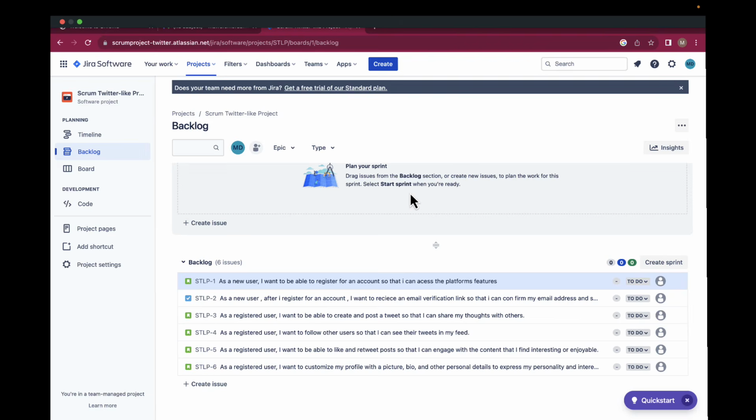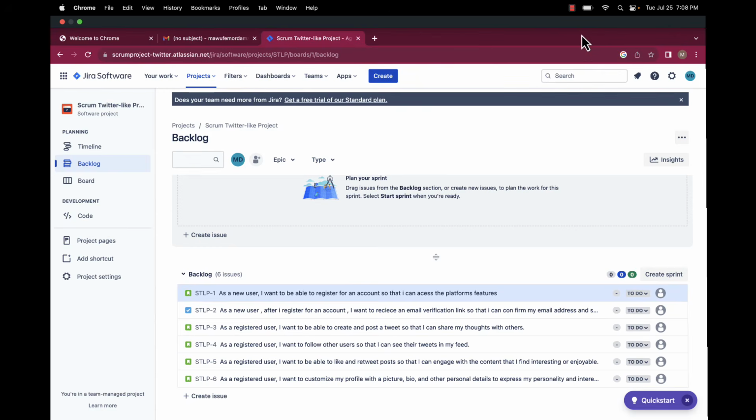So estimating is basically just providing it with a story point. A story point is a metric used in agile project management and Scrum to estimate the effort required to implement a given story, basically how hard the work is. The concept of story points involves considering the complexity of a task, the effort needed to complete it, and any risks or uncertainty in that task, instead of focusing on the time it takes to complete the task. Unlike traditional estimation methods, story points consider the overall effort involved.